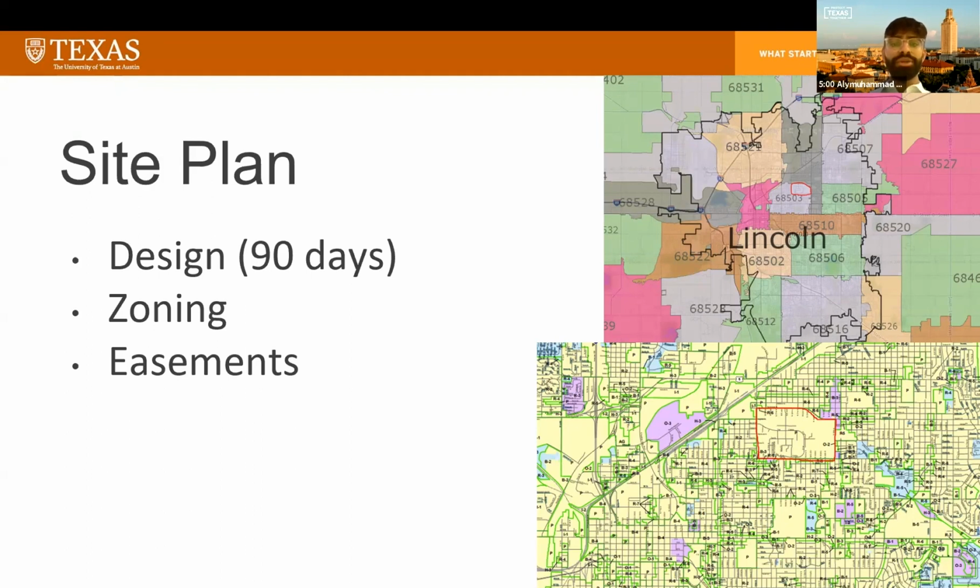In terms of land use, there are no future land use of the area which we'll be using for our ground-mounted PV system. Using the information from the U.S. Fish and Wildlife Service, there are no critical habitats, minimal flooding risk, and no washes or topographical concerns. In terms of easements, in 2010, the Nebraska legislature passed legislation requiring cities and counties in Nebraska to assess, evaluate, and promote renewable energy sources and energy conservation measures as part of their comprehensive plan updates. This statement allows us to see that solar panels are not discouraged, but encouraged to be installed through local entities.